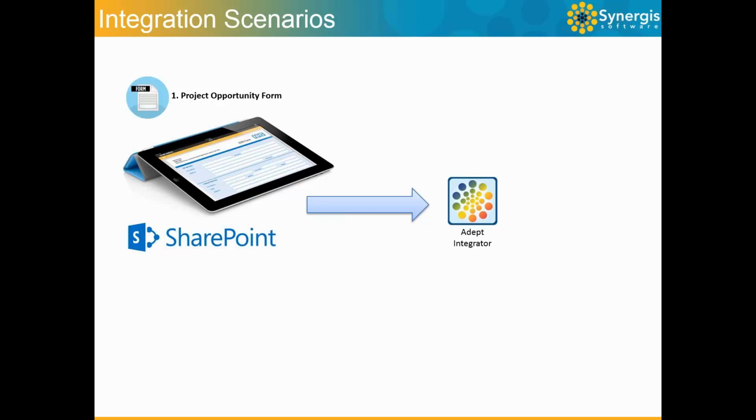In the scenario above, we have a request for money, an opportunity. Let's say a project needs to be created, and the client user is coming into this through a SharePoint platform. Once they come into the SharePoint platform, they need to update this opportunity and build a forecast of how they're going to spend the money, or how the time phase of that money is going to be run through the project. And from there, we need to scrape out the forecast information and update that into a cost management system. In this instance, it could be Prism Cost Management, or G2.